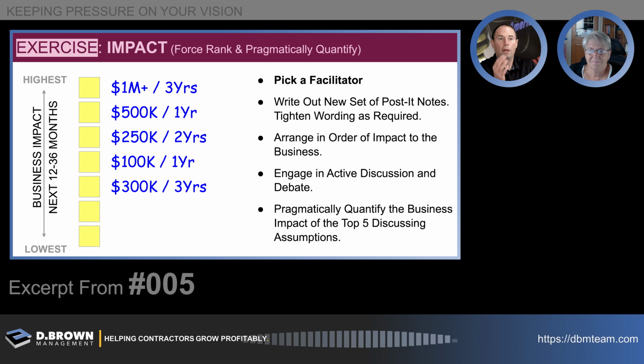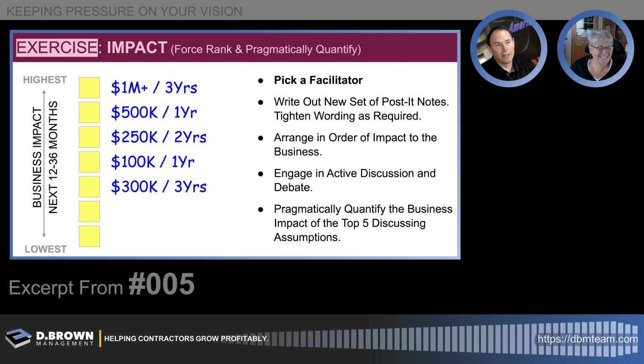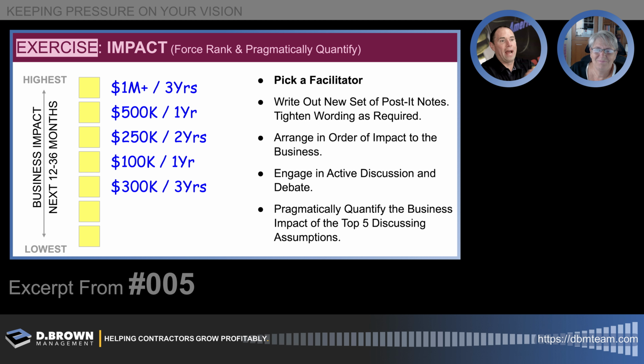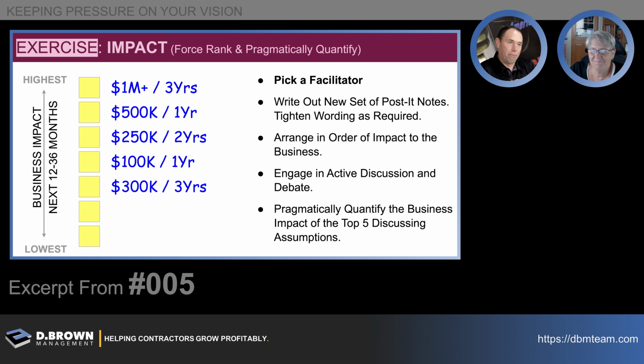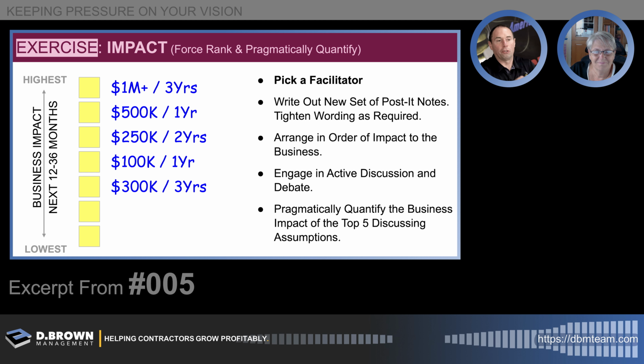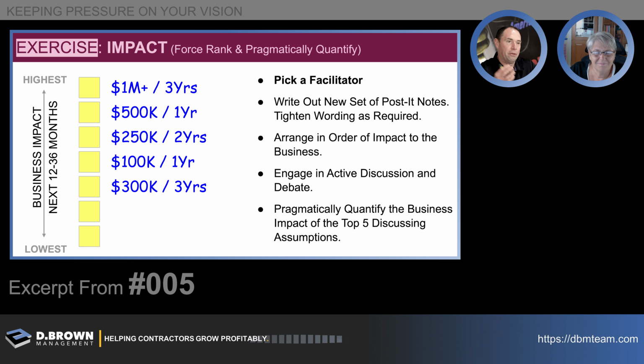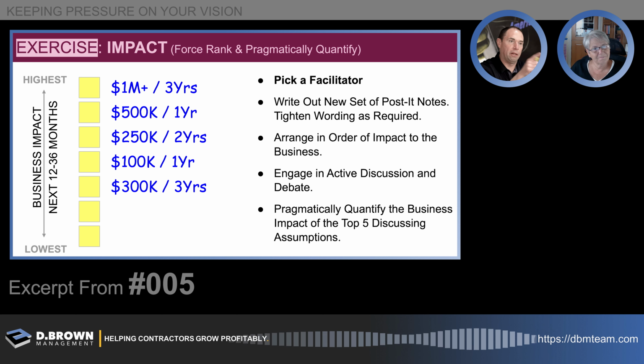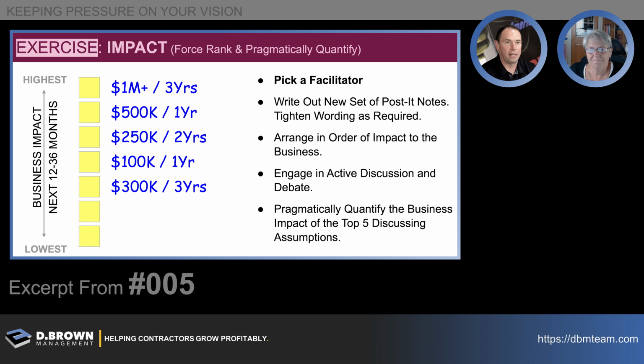And this is just one look at it. There are no decisions at this point. This is just the logic of going, well, that Post-it drives 3 other things, and that may be valid or not valid. If it drives 3 other things that are each $100 issues, that's not that big of a deal. But if it drives 3 other pretty major things, then let's focus on that thing, because that's a gating item.